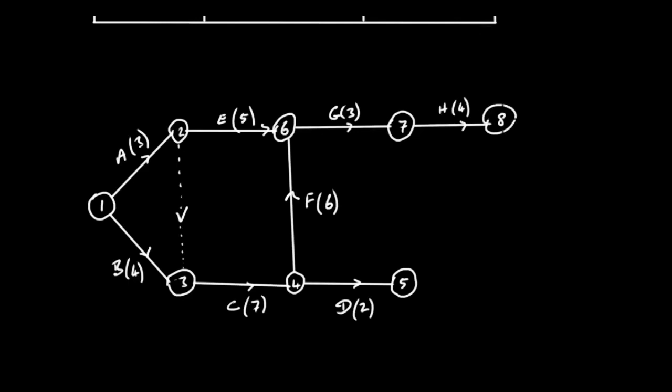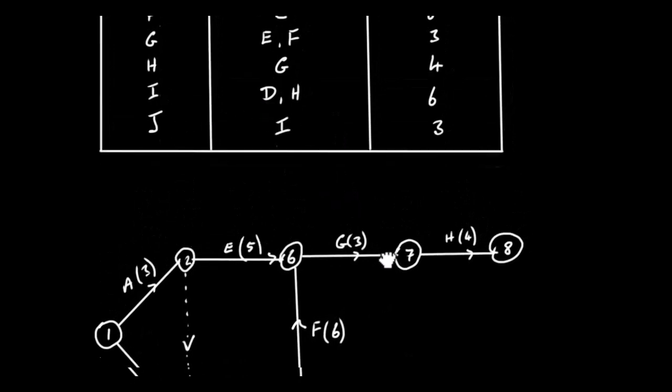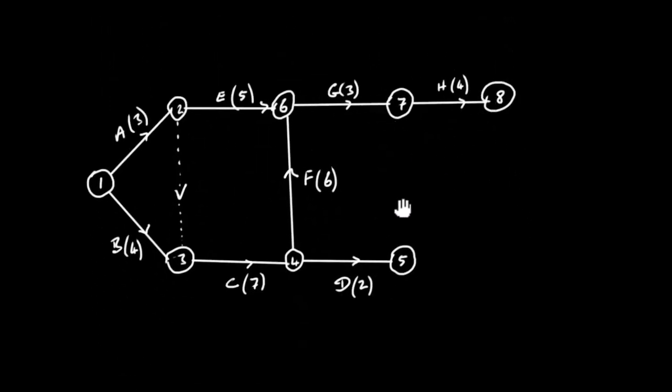This is going to be number 8. Let's look at the next one. I depends on D and H. So I depends on D and H. So if we were to draw I, let's say we can put it here, which has duration 6 days. I depends on D and H. Well, we have it depending on H, but not on D.